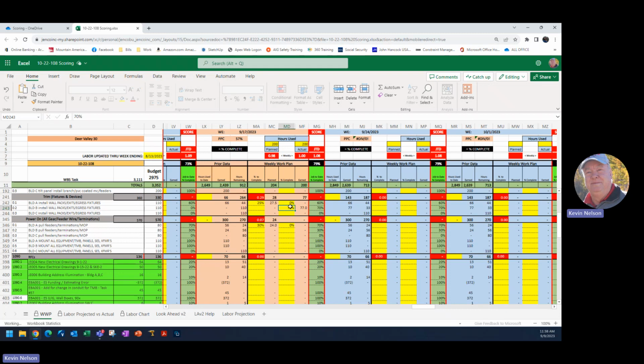But it's not bad news either to say we only got 50% done. And in my example, in this cell here, I can see it's 55 hours, and I've determined that's exactly what I'm going to need, around 55 hours to finish this task. So in my example, our weekly PAR score was a 1.13. I would much rather have an honest assessment of your PAR score as opposed to a fictitious number in percentage just to get you at a score of 1. That's not what we're looking for.